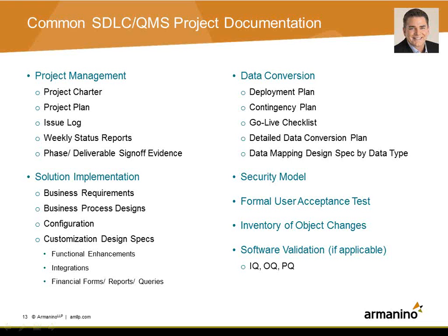On the project management side, they definitely want to see evidence of the client's involvement, management's involvement in the project. They really discourage somebody going and putting in your ERP system behind the curtain and bringing it back out, and then thinking that it's all going to work fine. They really want to see evidence that people participated in the weekly status meetings, that they made comments, that they captured issues, that those were resolved, all those good things that you would like to have.